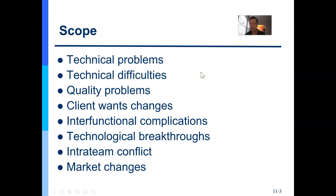Looking at scope — scope is about the objectives, and as we study the objectives, we collect requirements, usually through a business analyst. In requirements, we're looking to address or control technical issues and quality problems. For example, I was once installing Isilon Hadoop as a data lake and was told normal disk drives would work. About halfway through, we had a major issue and the engineers said we needed solid-state SSD drives, which cost so much more. That's why I had already set aside management reserves to accommodate things like that.